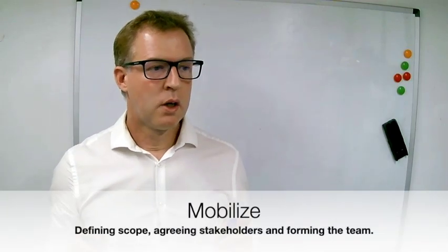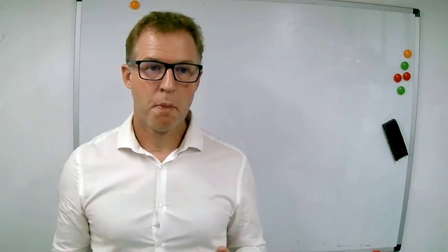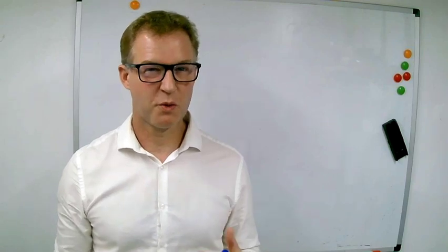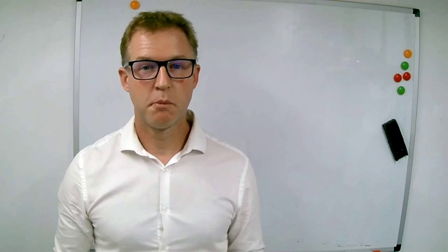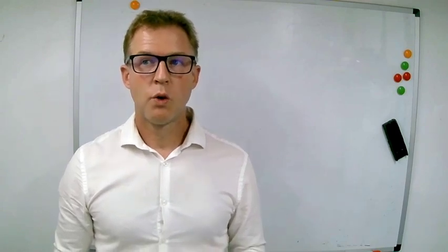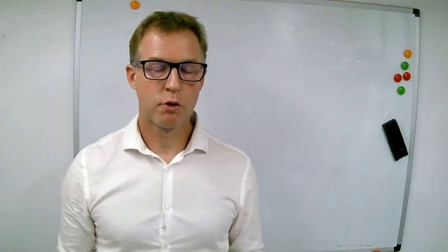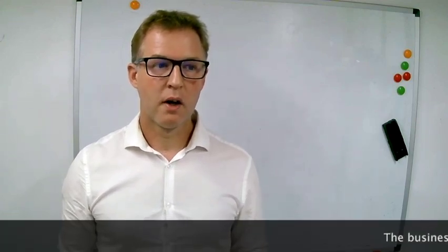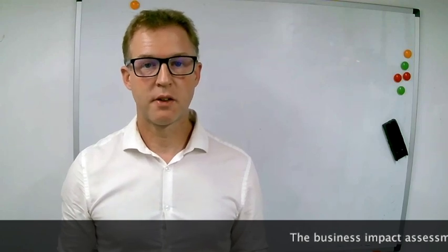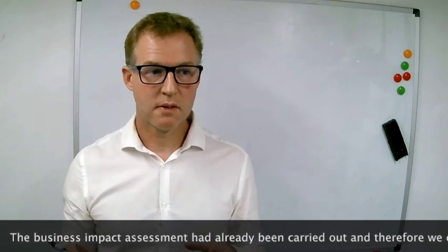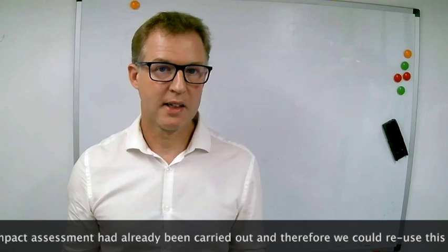So the way in which this worked for me, and I'm hoping it will work for you as well, because otherwise you've got quite a big first step, is we had a business impact assessment, and what this activity had done was agree within the business what the critical processes were. That was fortunate for me because I didn't have to lead a whole activity to work out what the critical processes were for the business. So first step, get your BIA critical processes.